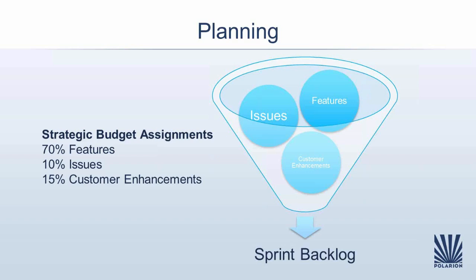Peter said that he is able to control the budget assignment for each sprint, as it is a pretty short time block, compared to ensuring such distribution for the overall milestones. So the goal was achieved, that the sprint was planned as a sequence of items coming from multiple value streams, respecting the budget assignments he agreed on with the management team.